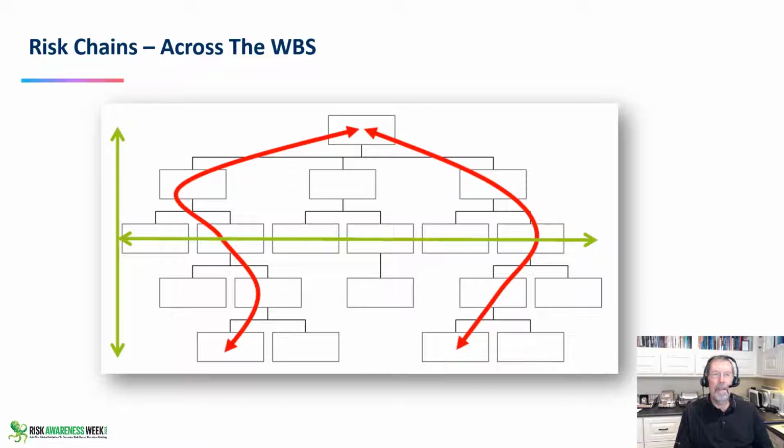So where do we go look for this stuff? Well, the place to start for looking for uncertainties that create risk is our work breakdown structure. We have a good work breakdown structure when the WBS itself describes the deliverables. The WBS, the work breakdown structure, is not work. That's described in the integrated master schedule. It's the products or the services that deliver the outcomes. There's a confusion sometimes when we say WBS. This is not the work. This is the deliverables. It's the product breakdown structure.